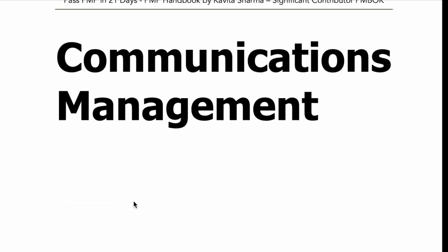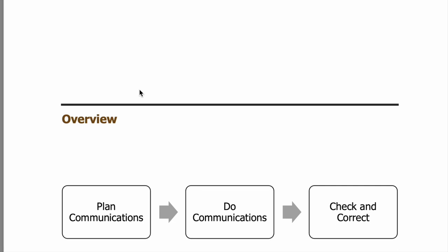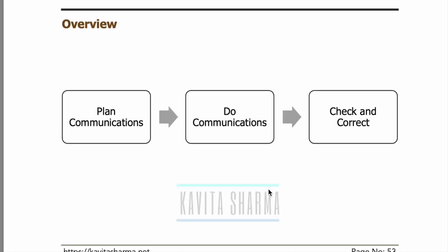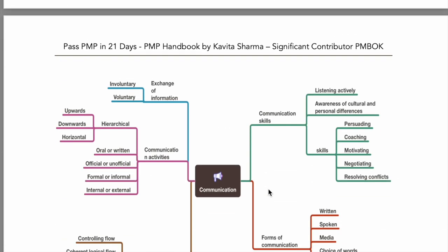We spoke about communication management. Communication and stakeholder go side by side. Based on the interest and information needs of a stakeholder, I plan to communicate with them. Then I actually communicate with stakeholders, and in case the overall engagement and communication is not working, I change. In case people say, hey, I don't know what's going on, then I would know that these are interested, not getting the information. I change their grid and start sending information or engaging with them accordingly.